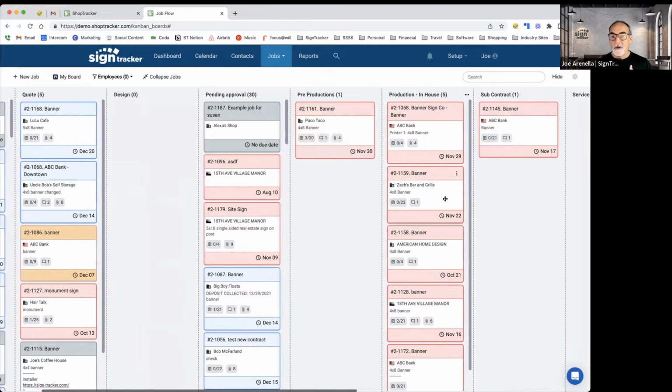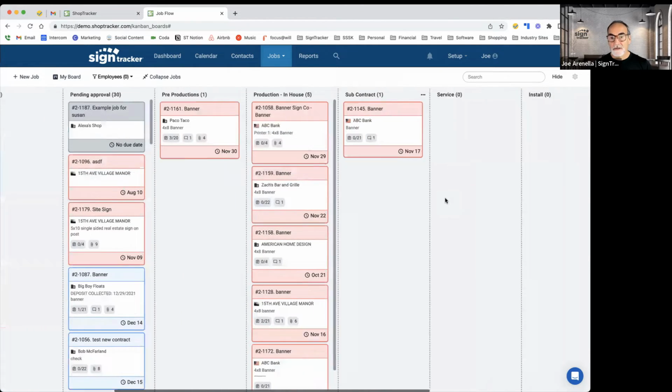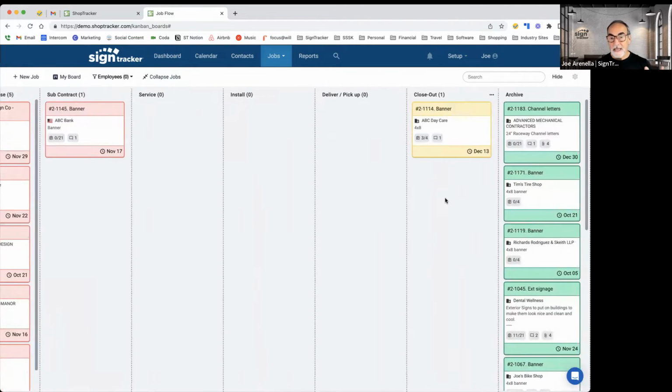So we would go through and really look at every single job, and then again would do it on Thursday, but Thursday was way more of a stand-up meeting. We would do the big one Monday after lunch. It would give us a little bit of time on Monday to wrap up the day, Tuesday, Wednesday, and then Thursday morning, we would have a stand-up meeting where we just talked about things that were blocking the project from moving forward. And that worked really well for us.